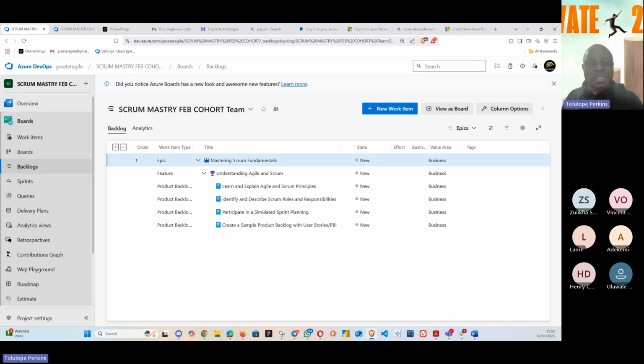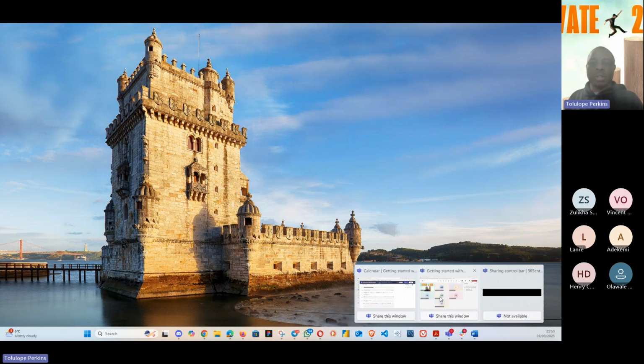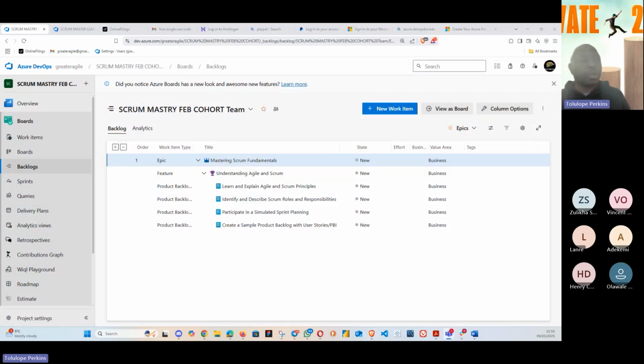So the first sentence he said was just what I was looking for. It means that you have allocated up to 4 hours. That doesn't mean that you must be there for 4 hours, but you should not spend more than 4 hours in your sprint planning. That's why Scrum is all about time boxing. So what other activities or events have been time boxed? What are the other activities that have been time boxed in Scrum?